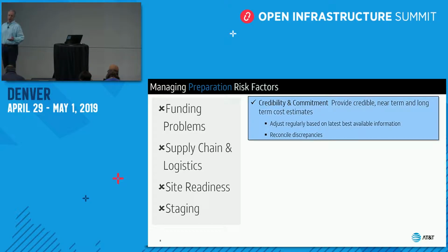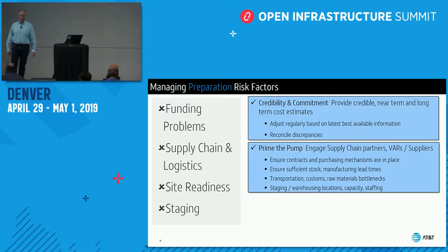Meet with those teams, those funding organizations. Let them know what's going on. How's the project coming along? Hey, we've got an update. Something changed. There was a price change. We needed actually more memory, and so now it's costing us more. Each server is costing us 5% more, but our plan hasn't changed. We're calibrating a little bit differently. And then reconcile discrepancies, because when your accountant partners see discrepancies, it scares them. So reconcile those.